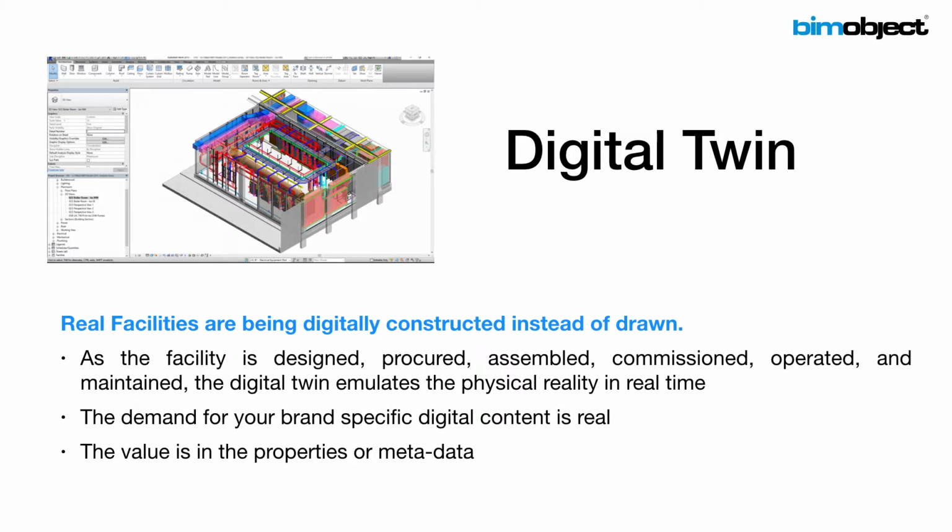I mentioned this a minute ago. That digital twin gets constructed up. It may start out as a single model on the designer's desk, but that model gets put into the cloud at some point and then gets embellished by all the actors involved. And it's done in real time, so people can see. The old days of having clash detection meetings once a week, when everybody works 4 days a week trying to put their own systems together, and then they meet 1 day a week, and then they have to go back and rework another whole week because half the stuff they did doesn't work. That's not effective.